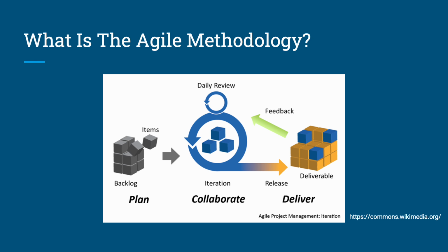We can think of these units of work as one or more requirements that will deliver value to a stakeholder upon completion. The backlog feeds items into the iteration phase in the form of a sprint. A sprint is a relatively short time frame, generally 1 to 4 weeks, but can be longer, in which a selection of items in the backlog, usually prioritized by the stakeholder or the product owner, are worked on and expected to be completed.